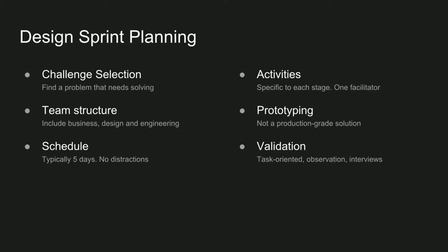So you have to be careful. And at the beginning of the project, I would suggest from an agency perspective, get your engineers to see the project proposal to the client, try to identify things that are worthy of a design sprint, and I'll give you some specific examples of that. But that's the first thing, you select what problem you're going to put through this process.